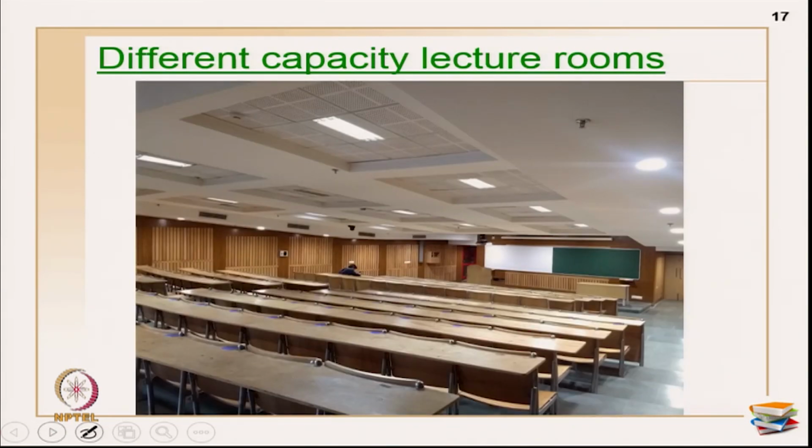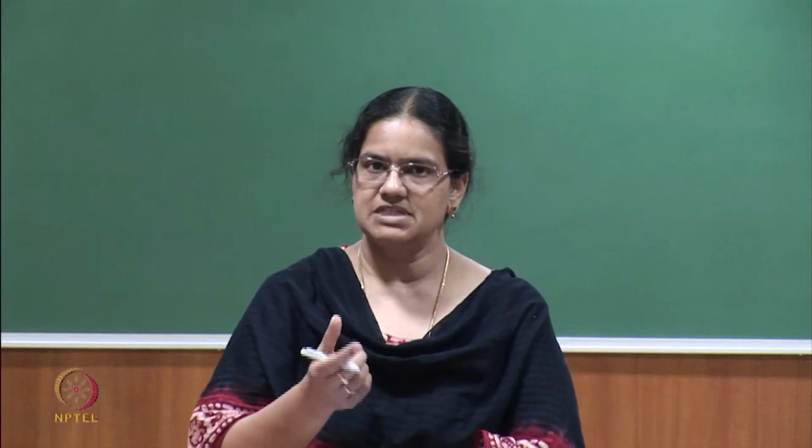and this is very famously called non-unit based repetitive projects. Now, for the same example which I have shown as the interior of the classrooms, I may be doing the interior of 4 classrooms, maybe even 15 classrooms, I can even do it for 20 classrooms. If you want to showcase an LOB diagram, the activity items which I have marked right now will be the same, but the number of sub steps will be different, and hence duration can also be different for all of them.